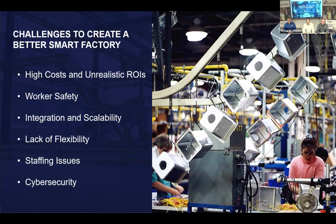Experts suggest that when estimating the cost of automation projects, the true costs of automation are about 3 times the cost of the equipment acquisition. So a lot of times companies look at the cost of a conveyor system, cost of a robot, cost of an automated process, and think that's the cost. You really need to estimate about 3 times that between installation, implementation, debugging, and upskilling your labor force.